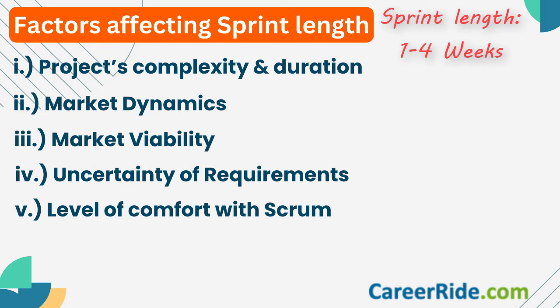Some important factors that affect the length of a sprint are: number one, complexity and overall duration of the project. Number two, market dynamics — for markets with rapidly changing conditions, you want to keep sprints shorter. Number three, market viability — if competition is high, you try to get the product out as soon as possible, requiring shorter sprint lengths. And uncertainty of requirements also affects sprint length. If the client's requirements keep changing, shorter sprints are preferred. Team's comfortability with Scrum also matters.